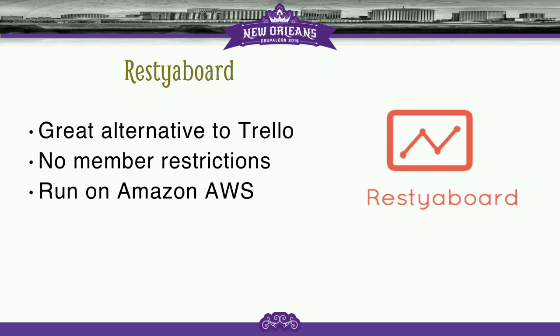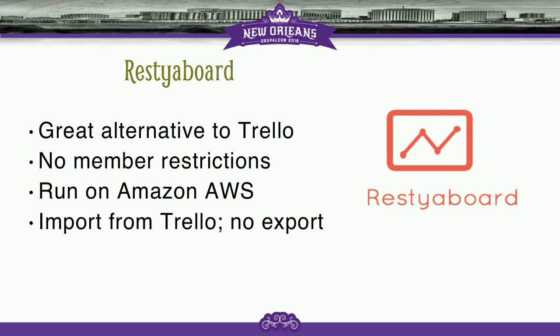Which is nice. So you don't have to rely necessarily, not that Trello costs anything, but it's now running independently on your instance. You can download it and install it, but for out of the box, I set up an instance in under an hour. How long does it take to spin up a web instance? And because they're gearing for this, they allow you to import from Trello. So when you're in Trello, you can do a JSON export of all your cards, let's say that master template you had set up, and now you can spin that up in Restyaboard.